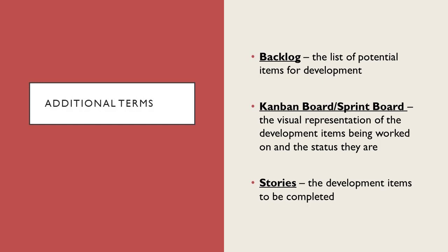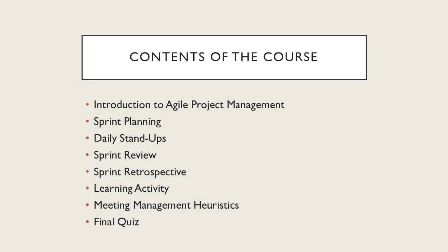You would essentially take items from the backlog, place them onto the sprint board to define them as being in that specific sprint. Again, instead of defining every single sprint and every single amount of time for each task, you take things one sprint at a time to be able to quickly and effectively handle these tasks and be agile in adapting to how to respond to the needs of stakeholders, technology, and environment. These two pieces, the backlog and the sprint board, are tools to make the sprint run effectively and the meetings associated with the sprint go smoothly.